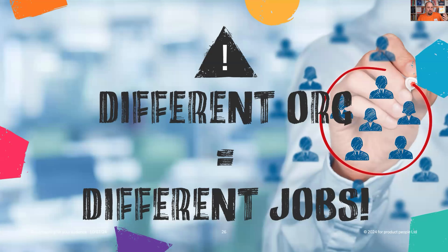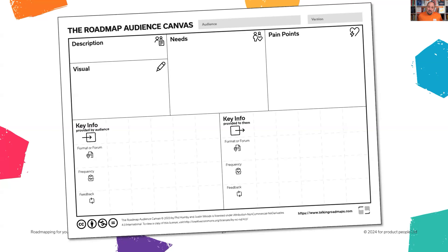The problem is those different audiences and jobs may vary from one organization to another. The CEO in your organization might have a different set of jobs to be done for the roadmap than the one I just described. What my co-host and I realized is we can't just say 'here's the perfect view for the CEO.' What we actually have to do is understand that audience. So we created a tool called the Roadmap Audience Canvas for identifying the needs, pain points, information they give us, information we give them, and how we close that feedback loop — so we can design the right roadmap for them.